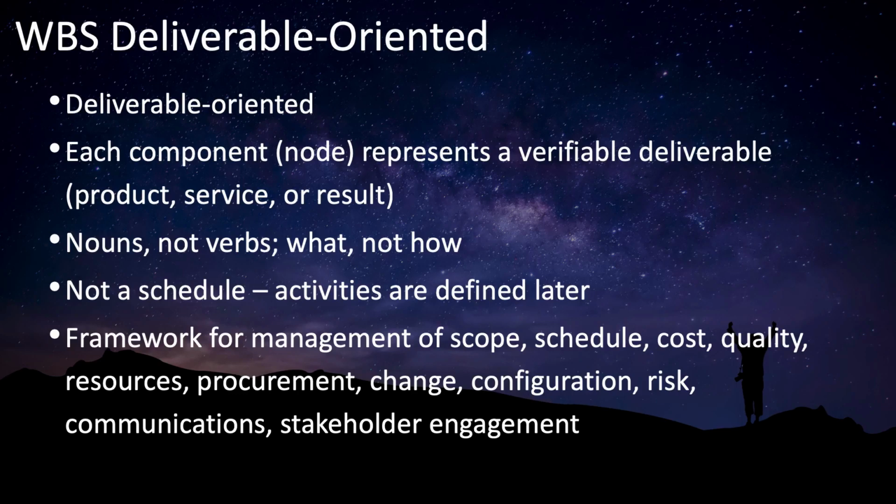The work breakdown structure is extremely valuable as it forms the framework for the planning and management of so much of the project. For example, scope. As you're managing scope and trying to control scope creep and changes to scope, this work breakdown structure will serve as your baseline of what is and isn't in the project.